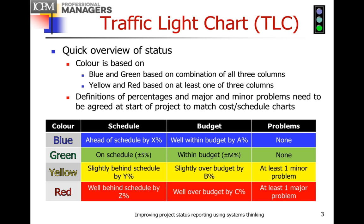Current traffic light charts use color based on project status: blue, green, yellow, and red. Blue tells you the project is ahead of schedule, within budget, and there are no problems. Green says it's on schedule, within budget, and there are no problems. Yellow says it's slightly behind schedule, slightly over budget, with at least one minor problem but planning to correct by the next reporting period. Red means well behind schedule, well over budget, or at least one major problem.